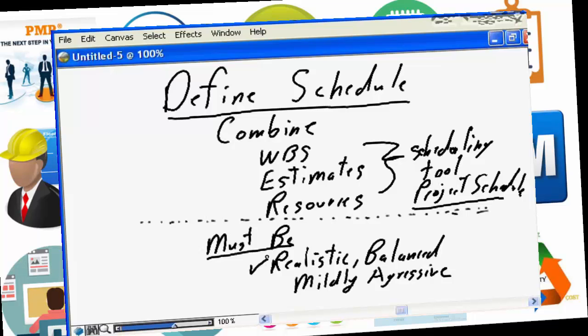We believe, based on all of the information we have at hand, that the WBS is complete, that it is not over complete. We have not padded it with extra effort, but it is the actual WBS that is required to satisfy our project scope. It is well balanced. A well-balanced project is where the resources are fully utilized. Once a team member joins your project, they are on the project for the appropriate duration, running at full utilization.